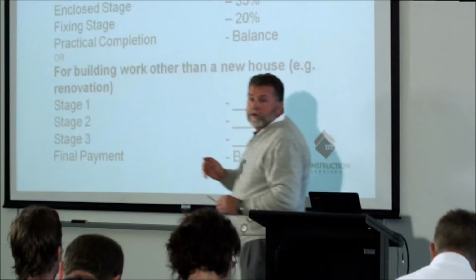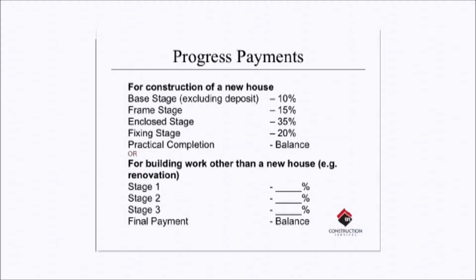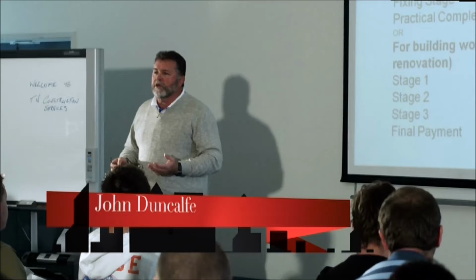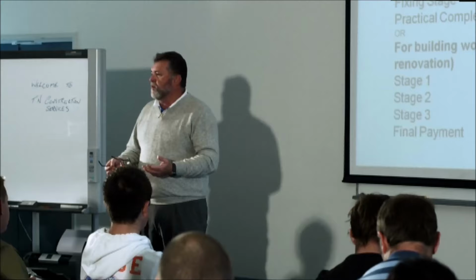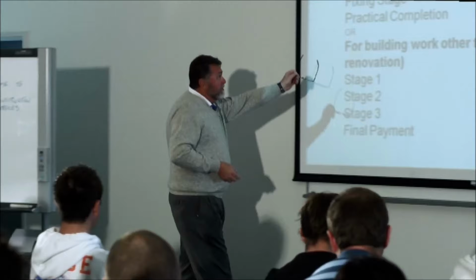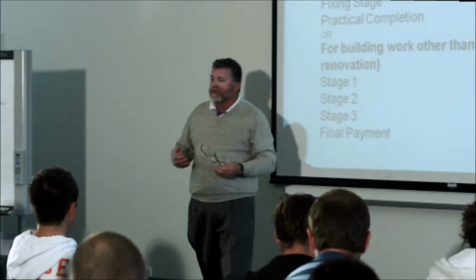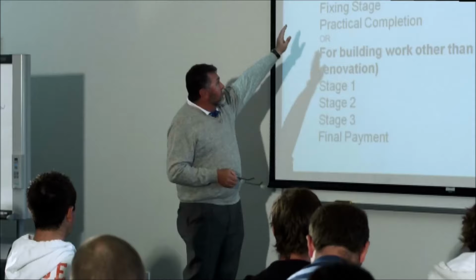Okay, progress payments. As Paul said earlier, the situation you have with progress payments is that they are already prescribed to you under the Domestic Building Contracts Act. It is not something that anyone made up. It's not something that the BSA made up, the HIA made up, or the Master Builders made up. These payments here, which remember what Paul said earlier, was in relation to the deposit, which is fixed at 5%. You can't take more than that 5%. When you get the base stage down, you've got a 10% payment.